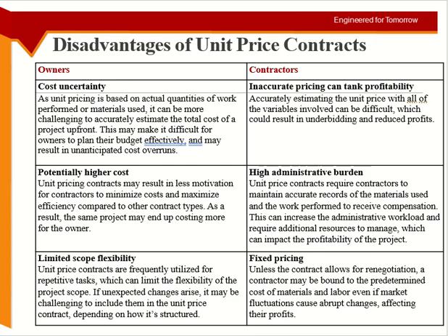But what if not the amount is changing, but the rate is changing? Okay, the concrete prices went up or the steel prices went up, there's a shortage of cement or something. Okay, so it's easier for the client to increase or decrease the amount of work than it is for you to increase or decrease the unit rate of the work, right? But this is the whole basis of the contract. If you are going to increase or decrease the rate, then what is the purpose of doing this?